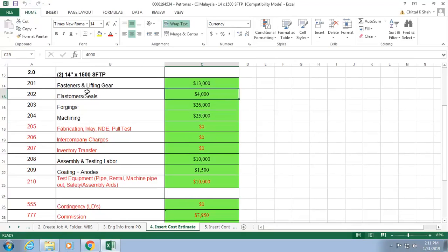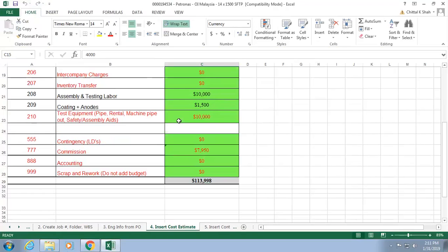Your first job would be to figure out what are the things you're going to be working on, break it down into manageable chunks, and allocate budgets to it. It might not look exactly like that. It might look like that. So you can use this as your basis, but you have to go and figure out how you want to spread those budgets, right? And we'll talk more about those engineering projects and the assignments. But that's your first clue. That's where your budget starts. So if you take this total, that's going to match the total of the cost you were seeing outside, right?